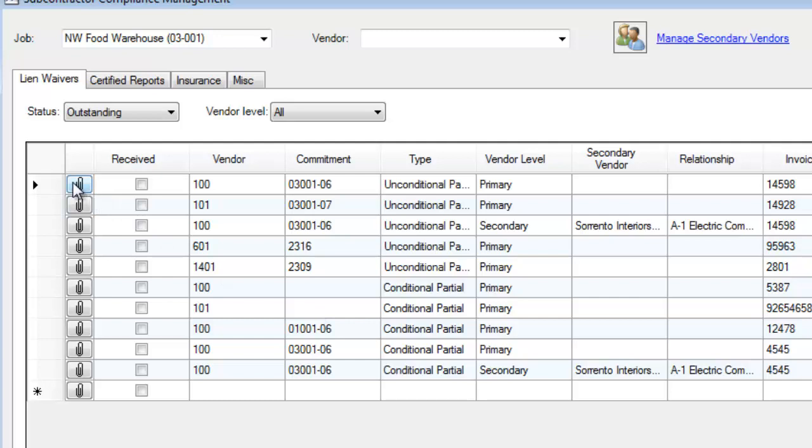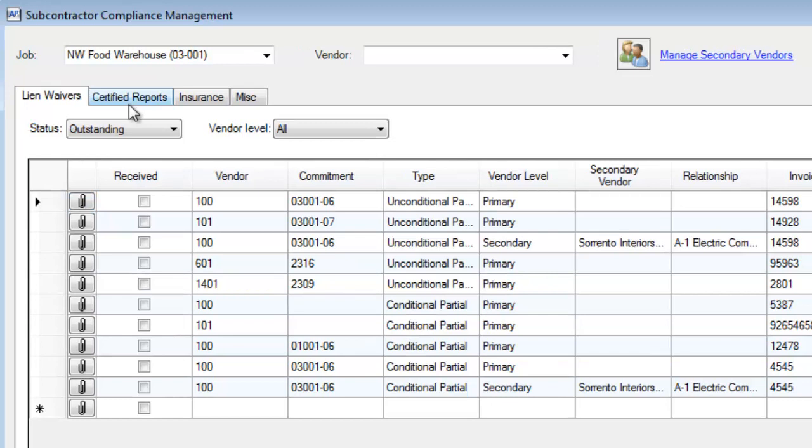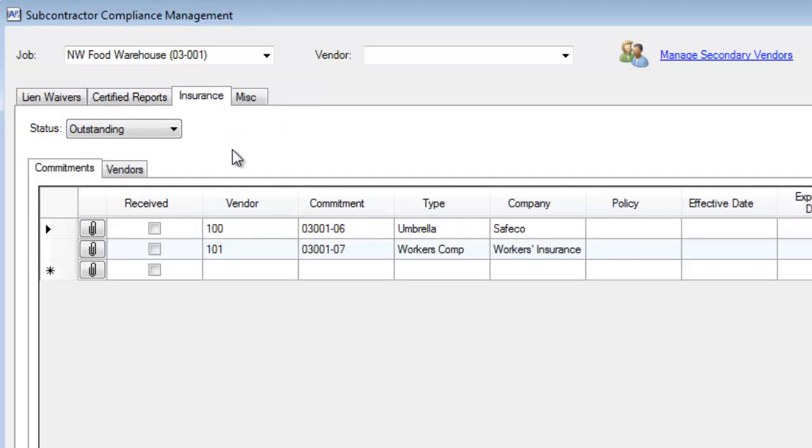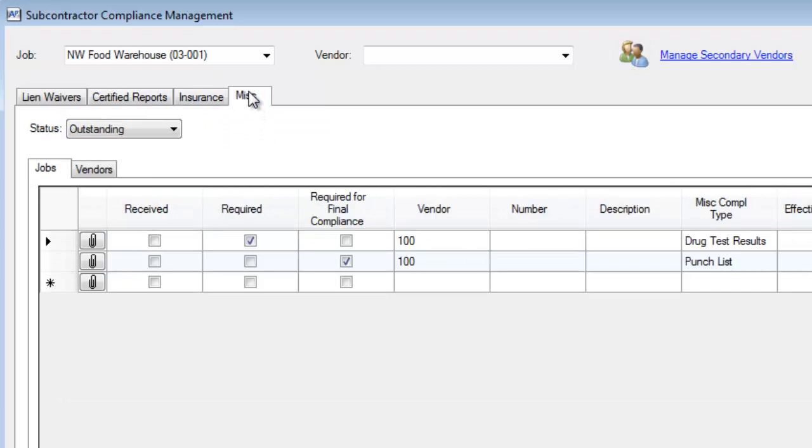I also have a paper clip here, meaning I can attach a scanned copy of that lien release once I've received it. That way, it's inside of the software for anyone to be able to view. I can also keep track of any certified reports, any insurance certificates, and any miscellaneous items.